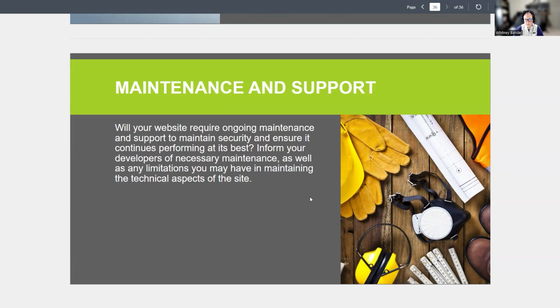Having that really clearly outlined, whether it's following up with them and saying we're going to do training and be around for questions for a month after the website's launched, but making sure that it's clear when would be the end. Are you going to keep copies of the website? Are you going to delete backup copies of anything once you've terminated the service and you're no longer working with them? Giving a clear idea of what you will and will not do is really important to have.